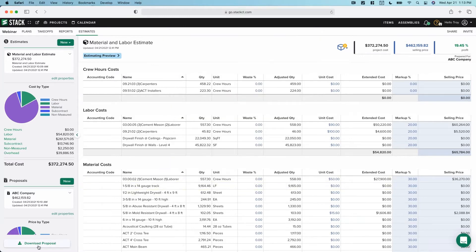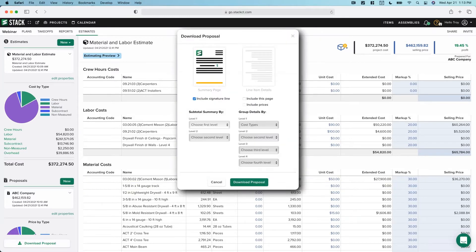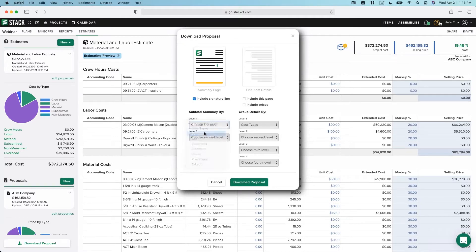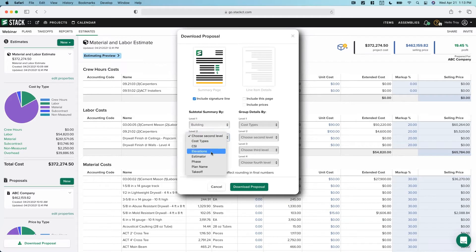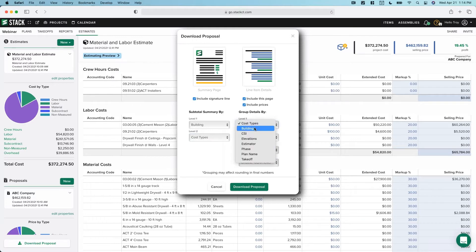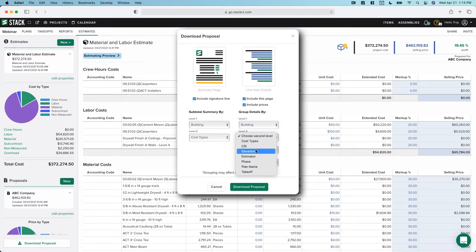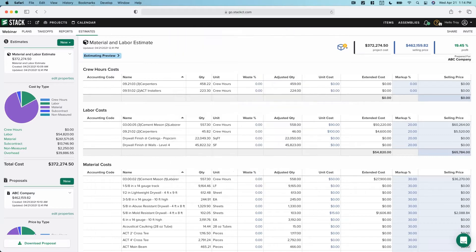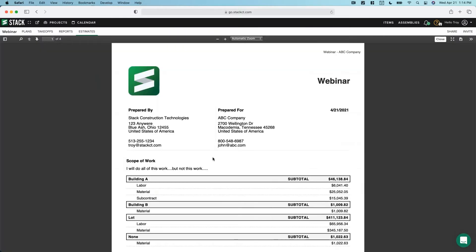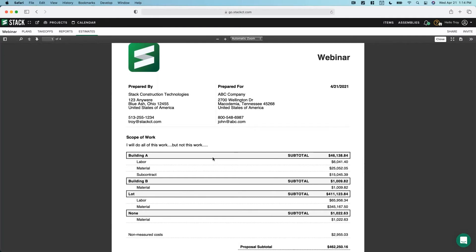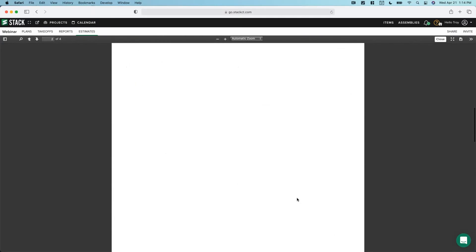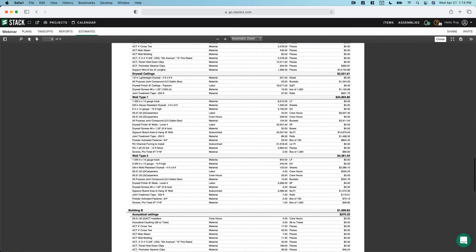Ultimately we're going to end up in the proposal, so you can see how to take advantage of your different groupings and subtotalings. I could group by building and then by cost type, and include an optional page — by building and by takeoff. So once you get to this stage, you have an actual document that you can deliver to your customer that is subtotaled and grouped in a summary type section, as well as an optional detail page. This is where we're heading.